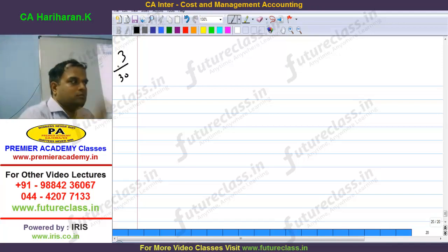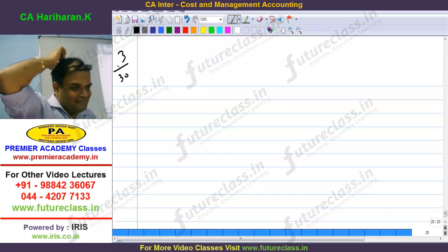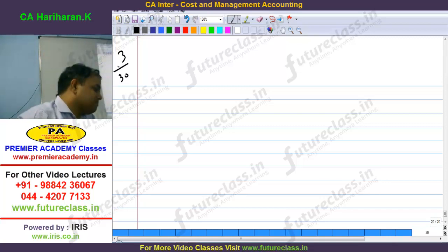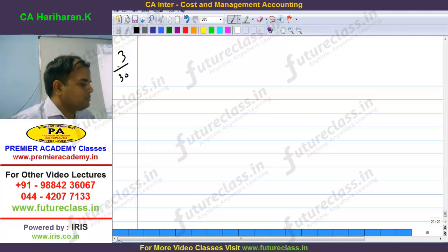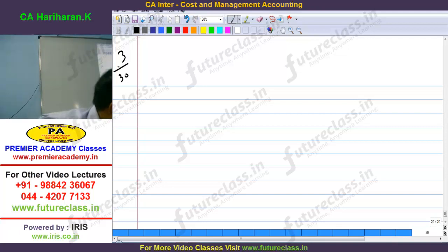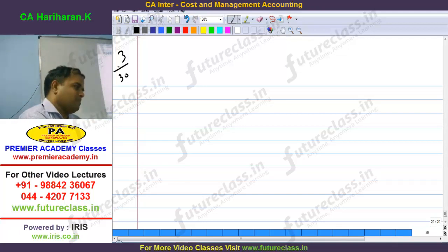The company has furnished the following data relevant to two jobs undertaken by it in a period. Required: computation of percentage recovery rates of factory overheads and administrative overheads, calculation of the amount of factory overheads, administrative overheads and profit for each of the two jobs. Using the above recovery rates, fix the selling price of job 103. The additional data being direct material 24,000, direct wages 20,000, percentage of profit on selling price 12.5%.